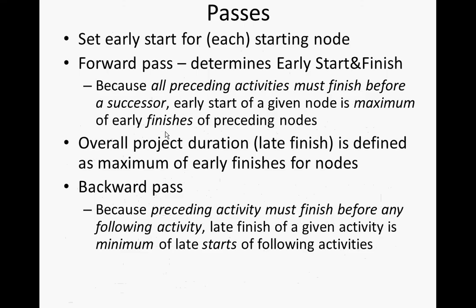The algorithm is going to consist of two passes. It's going to be a forward pass that determines early start and early finish, and there's going to be a backwards pass that determines late start and late finish. Or if I were to express it reflecting how it's actually computed: first pass, early start, early finish. Backwards pass, late finish, late start. Okay.